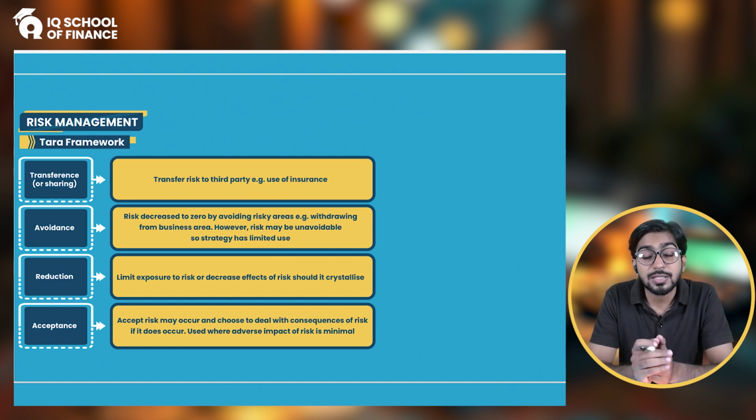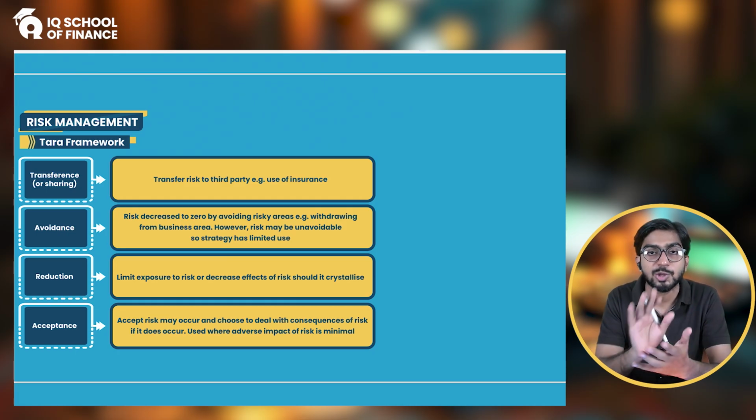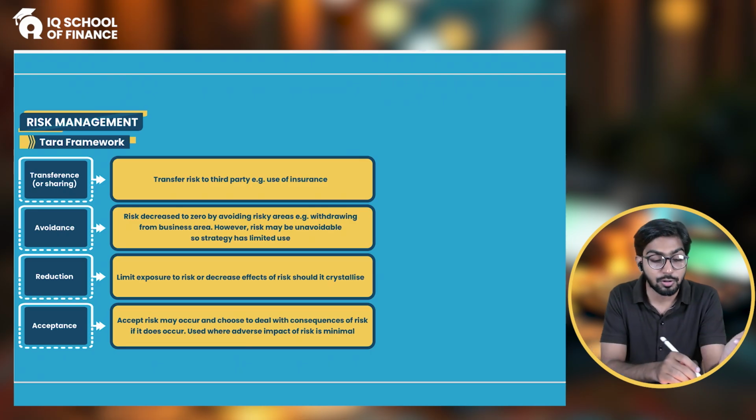All right. So there is a risk that, for example, one of your employees gets a severe disease, and it needs a huge operation to be treated. The employee is required to be operated on, and the operation cost is in millions of dollars. So how are you going to arrange it? It is going to create a huge risk for you, right? So again, you will purchase an insurance cover, so that whatever reimbursement or expenses the employees demand from the company, the company will pay it and then get it reimbursed by the insurer. So in this way, you transfer the risk.